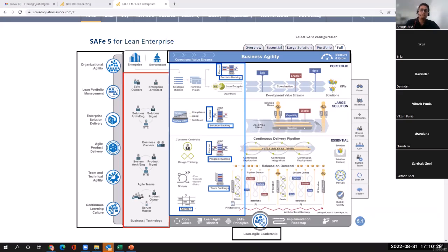The fourth question to check is, what exactly is there in the backlog? What are the backlog items that are there in these backlogs? So for a portfolio level, so these are levels of SAFe. So for portfolio level, we have epics and enablers. If you click this, you will know what is epic. If you click this, it will explain what are enablers as well. But epics and enablers are the backlog items that are captured in portfolio backlogs.